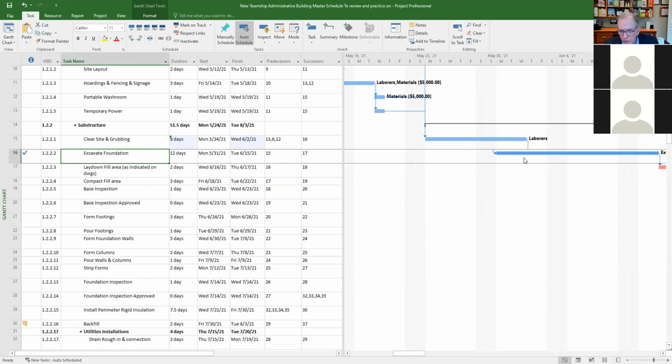If I wanted to really show the impact, like if this being delayed affected that, then I shouldn't have had this shown as done. Right? Because if I zero this out now, see what happens? It pushed it. Yeah. Okay. Just getting to understand the logic of how it works.